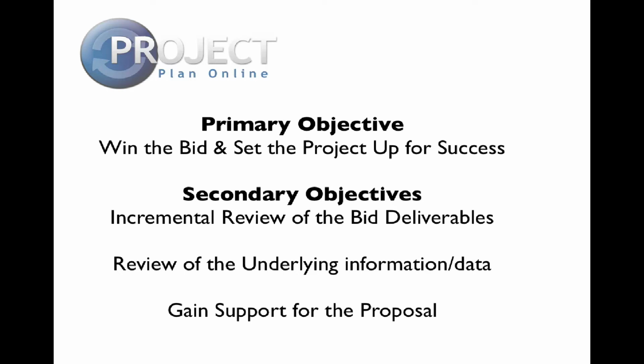Secondly, to check the accuracy and quality of the underlying information. When you do a bid, you'll most likely put an estimate of cost together, analyze and mitigate risks, identify and maximize opportunities, review and establish a commercial or contract framework, and set up the schedule and project management framework. Most of these things will not be deliverables, rather they feed into the deliverables, but to ensure their accuracy, you need to review and have them approved by the responsible managers just as you do the deliverables. More importantly, the responsible manager needs to have a role in the development and buy into the project strategy. This makes the project manager's job so much easier during the project execution.